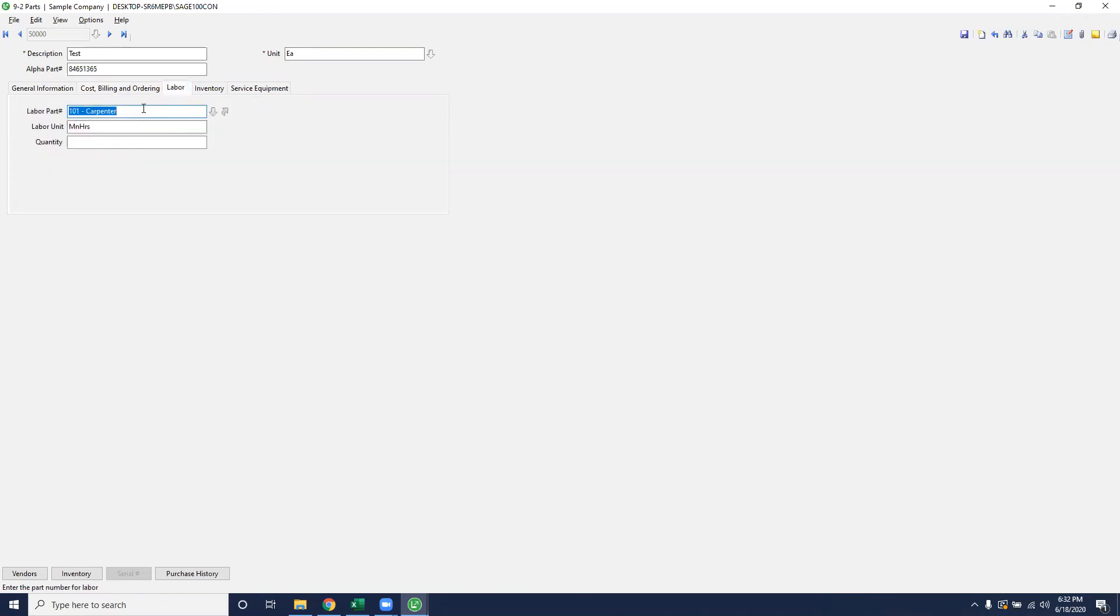The next item over is labor. You can put on a labor part that would associate this part, the test in our example, the labor part that would be for man hours. So then you can type in how many man hours it would take to complete that part.